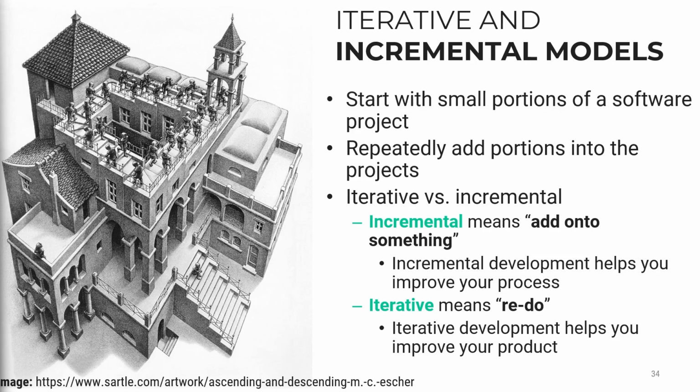The duration of iterations is generally fixed. It is predetermined to be 2 weeks, 4 weeks, a month, 2 months. It doesn't matter. It depends on the size of the project, on the manpower, but it has to be fixed. The feedback and lessons learned from each iteration would be used to improve your working process or the product in the next iterations.